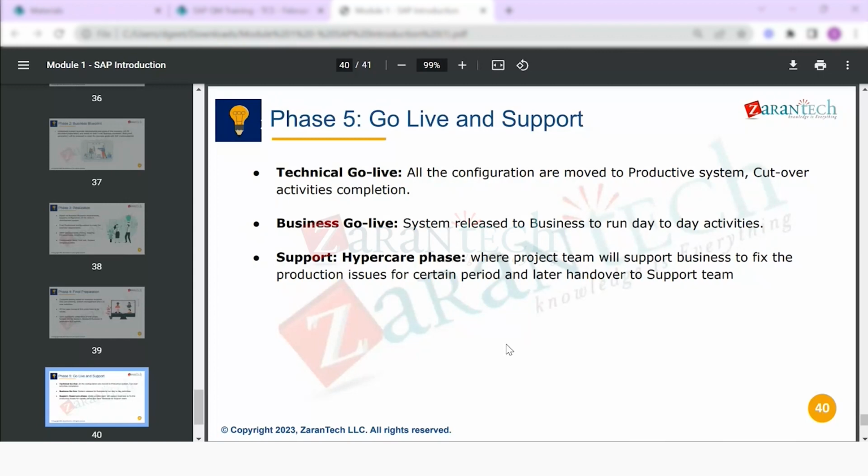Agile is not like starting with the complete requirements. If you are going with agile, you will collect like 50-60% of requirements and start with the project or development. During the development phase, the additional requirements will come in, because we are not waiting for 100% of requirements to be collected. At least 70% of requirements is there, so let's start the development.